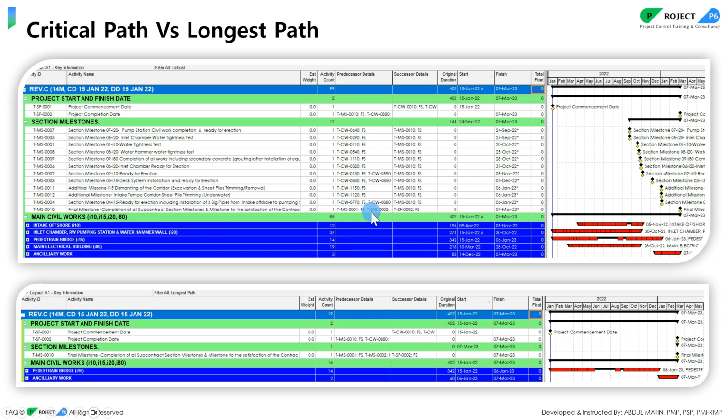Okay, but in reality, the real critical path is only the I-15. You see here the longest is the I-15, and then we will do some ancillary work, demobilize, site cleaning, and done. So this is the final and the true critical path. But why is the critical path here showing with all the areas? Because of the milestone constraint we have put here, finish on or before.